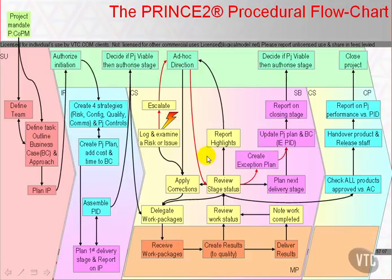Taking each in turn: when an exception report shows that the current stage will not complete to its current stage plan, plus or minus agreed tolerances, then the activities of managing a stage boundary may be used to bring a premature close to the current stage and create a new stage plan — also, probably a revised project plan, revised business case, revised risk profiles, and perhaps revised role assignments and responsibilities.